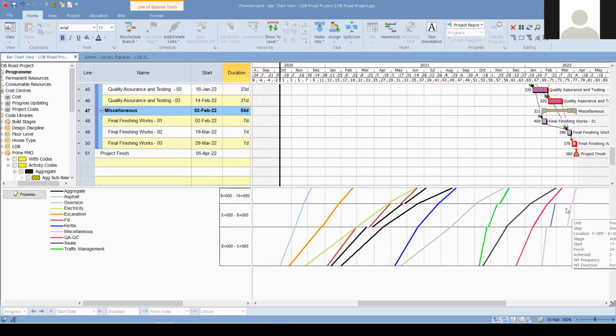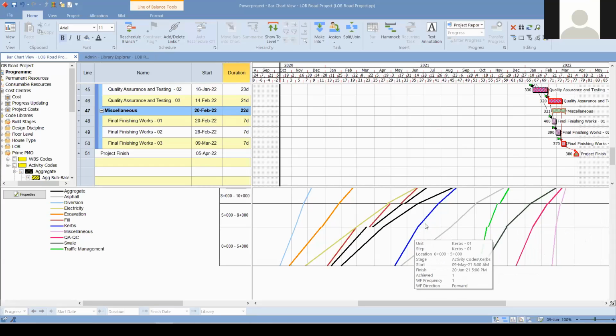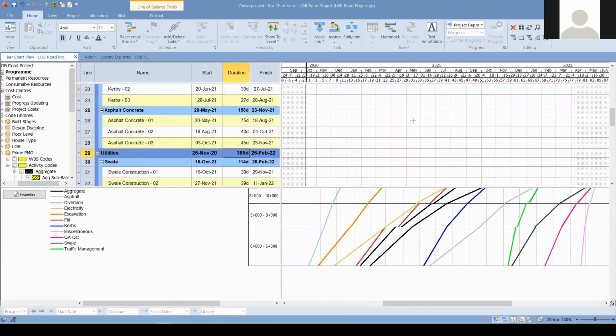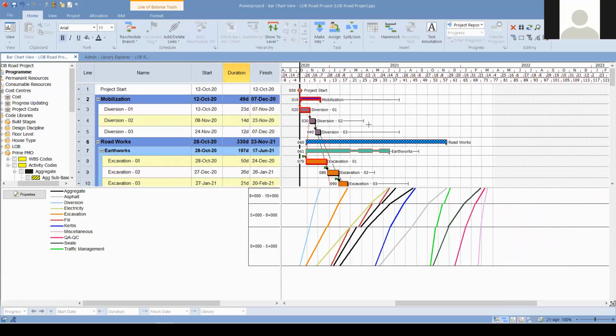Without extending anything on our project finish date, we are able to play with the activity starts and finishes, making sure they are all following their previous crew activities, and we are able to finish the project scope on the 9th of March, which is much before the 5th of April. Approximately 1 month earlier, we are able to finish these activities, also the project, earlier than the first plan.